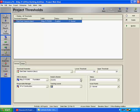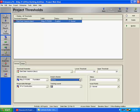Next, I can select the level of detail to monitor. It's either at the WBS or the activity level, and I selected the activity level. I can also assign a responsible manager to this threshold. And that would basically be the person who's responsible for resolving any problems associated with this threshold.